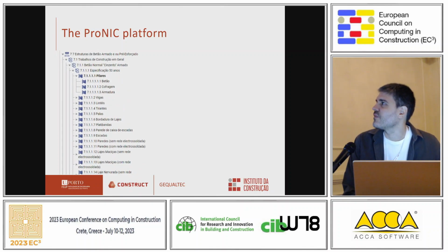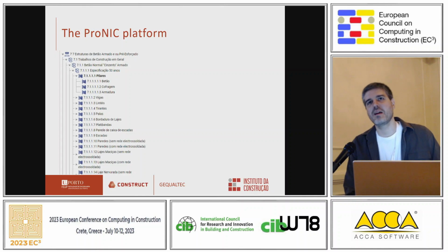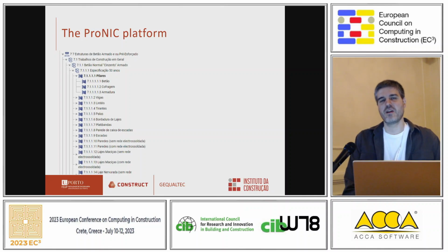You can probably not see it very well, but that's just a portion of the tree. It's literally a tree. It's organized on chapters, where each chapter is kind of like, not quite a discipline, but you'll have something like foundations of concrete, wooden structures, you'll have landscaping, you'll have construction site management. It's really very, very wide. Everything related to construction has a place on the tree. And as you go down the levels of the tree, you'll come up with the actual work item, okay? That's the key element here.